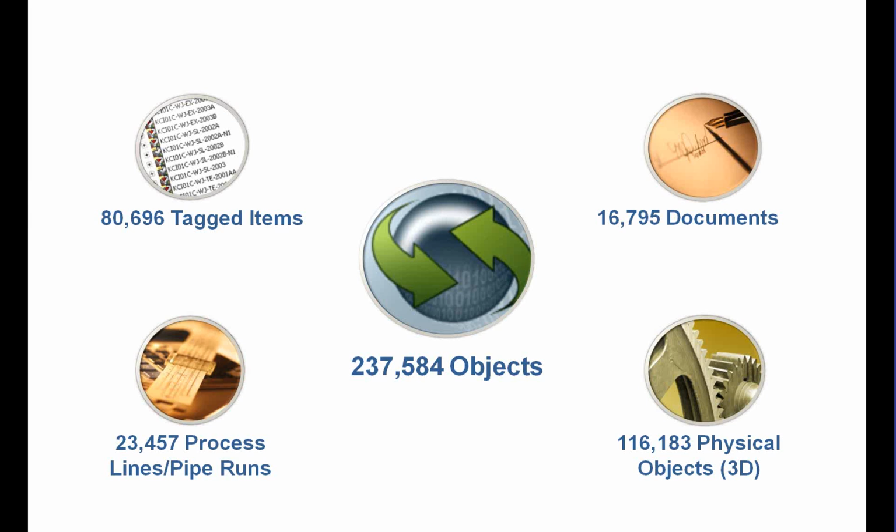We manage a lot of those internally, and we're used to dealing with large-scale projects. But this project in particular, let's just take an example of the startup and commissioning group. A record number of turnover packages or startup sequence packages for a large project for us is somewhere around 400 or 500 packages. This project has double that already, around 1,000 startup packages to check out and commission for